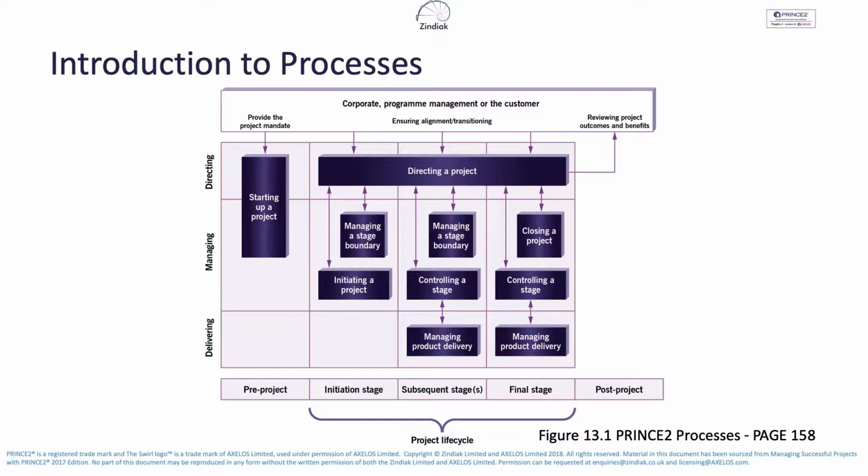So at that stage, we have the project executive. And in starting up a project, in the minimum amount of time possible for the given project, and obviously depending on the size of the project, that'll vary greatly, is the project viable? Is it worth spending any sort of significant resource, effort on the project, or should we just stop at that early stage? Have we got a viable project? Is it desirable and is it achievable? They're key questions we'd be answering at that stage.